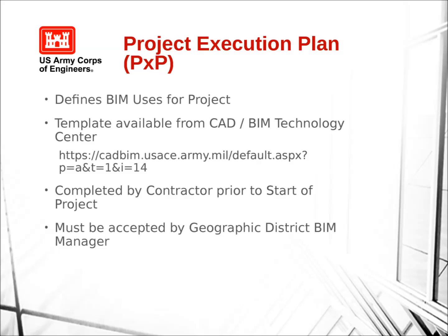And as I had mentioned earlier, the template of the project execution plan is available from the CAD BIM Technology Center's website. There's a link here, but like I said, you can simply log in at the top level and search for it. The idea is that this is completed by the contractor prior to the start of the project and must have review from the local district's BIM manager for acceptance. Sometimes through lack of education or understanding, these PXPs have kind of fallen through the cracks a little bit. So it's up to us to ensure that everybody in the design team and the PM team is in sync, and hence having the BIM manager review these PXPs for acceptability is key.